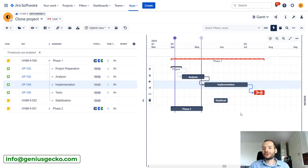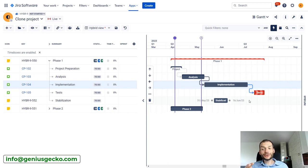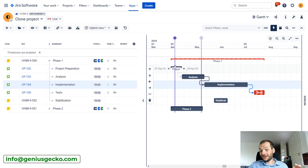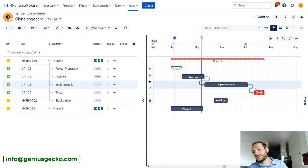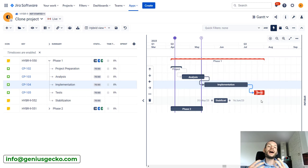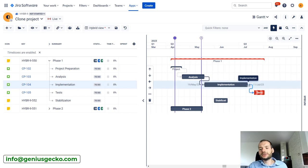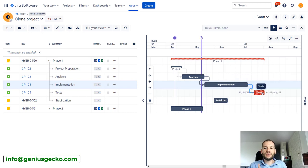So these three are no longer on critical path and suddenly it looks kind of like critical path is not working. Because we have multiple tasks with nice dependencies between each other and yet only one task is marked as being on critical path. But it really makes sense because this task can still be delayed without delaying the last one.